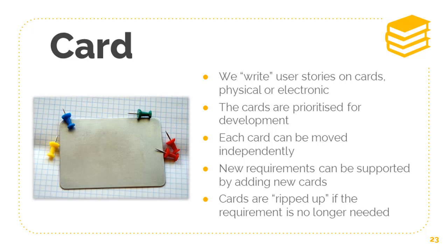In fact, a new requirement may emerge from testing with customers. Perhaps users need the ability to change the size of the text, and that's of more value than the original story. The concept of user story cards encourages the team to slot the new story in as a higher priority requirement. As well as being moved around, the concept of user story cards encourages teams to get rid of things that aren't needed. Taking our screen and text color example, let's suppose that our application designers have gone with a mainly pictorial interface. The user story card concept allows us to simply rip up the redundant card that we don't need anymore.